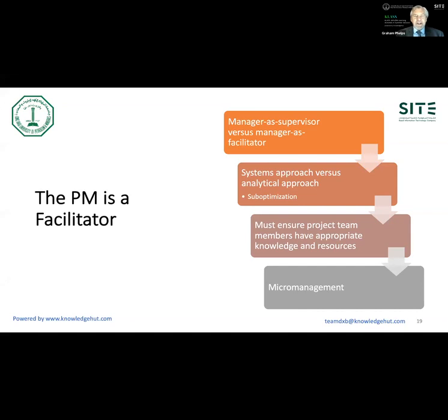Here's a thought on this. I call it the 3 C's of project management. The first one is to command. The second one is to consult. And the third one is consensus. So, command: this is my way of doing it, this is how I want it done. Consult is, what do you people think? What do you think is a possibility? How would you do it if this was you? And you listen to people and then take advisement as to what we should do. But it's still your decision.